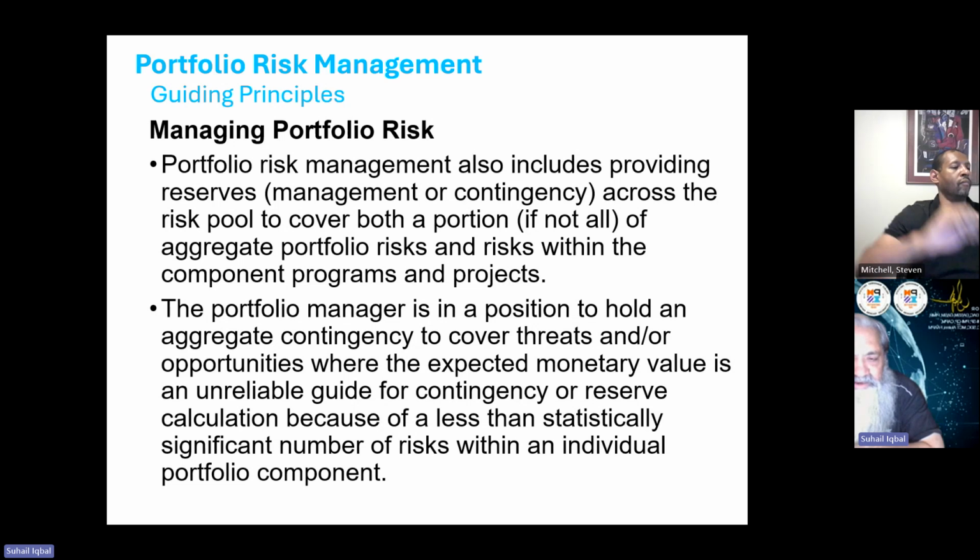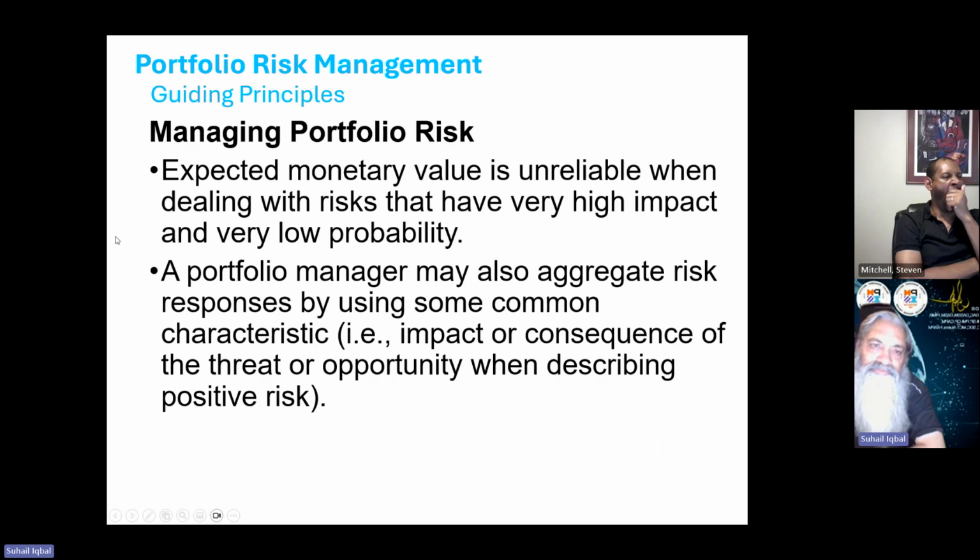Therefore, we do not use it as much, because of a less than statistically significant number of risks within an individual portfolio component. Expected monetary value is unreliable when dealing with risks that have very high impact and very low probability. Very low probability, very high impact: the EMV is useless. It means that it cannot give you very reliable results.